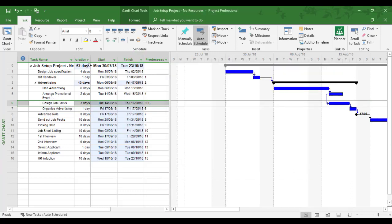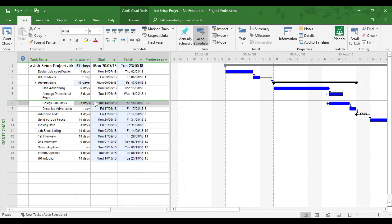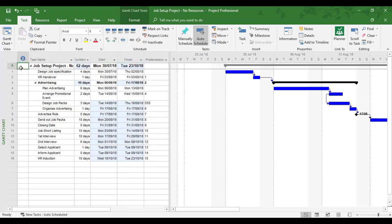So it's brought it back and saved two days. Because two of the days can start at the same time. And the third day then is extra. So that's why it's only saved two days and hasn't saved three days. So we can now see the effect of modifying links to tasks and change in order in a project when you've set it up.